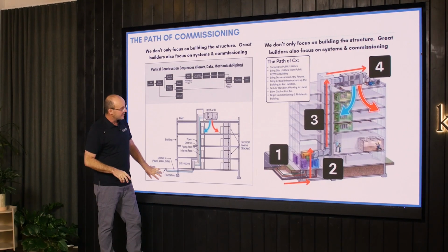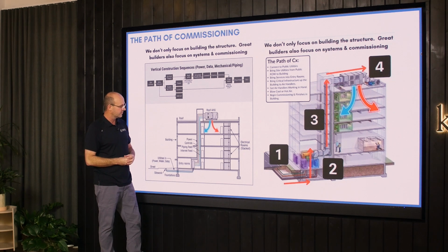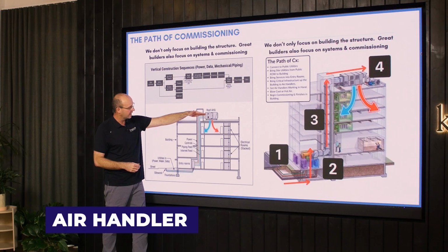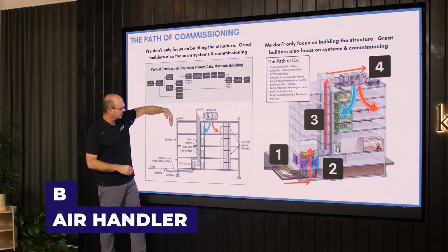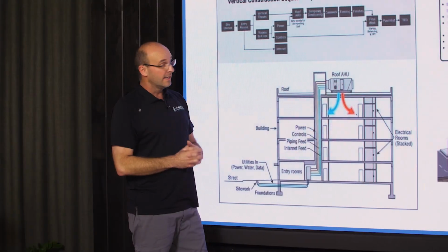So that is how I look at it. That is how I visualize these systems before they're installed. And typically, I'm going to track some key milestones. I'm going to track this as a milestone. I'm going to track the air handler as a milestone. And I'm going to track getting the building sealed in as a milestone, crucially. And that's how we look at it.